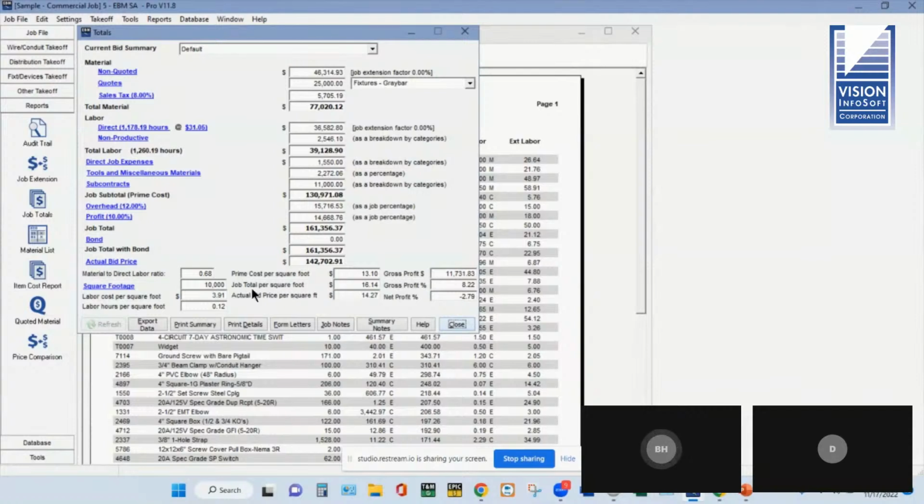The other numbers that I think are even more helpful are the labor cost per foot. You see on this job, it's $391, because that takes out the whole material factor part of it. Again, if the job had owner furnished lighting or owner furnished switchgear, the labor cost per foot's not going to change. So if you compare this job to another job, whether or not the material was furnished by the owner, that cost will remain constant, or it should be similar.